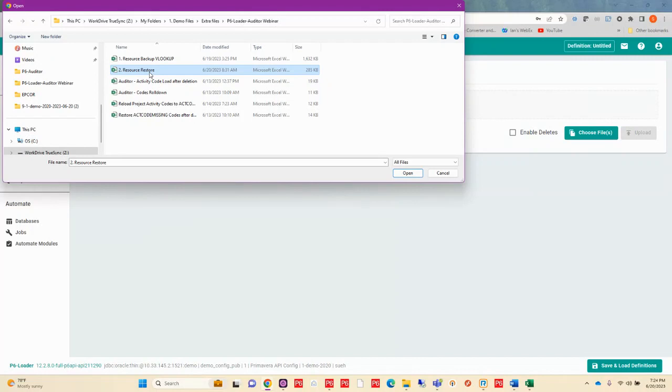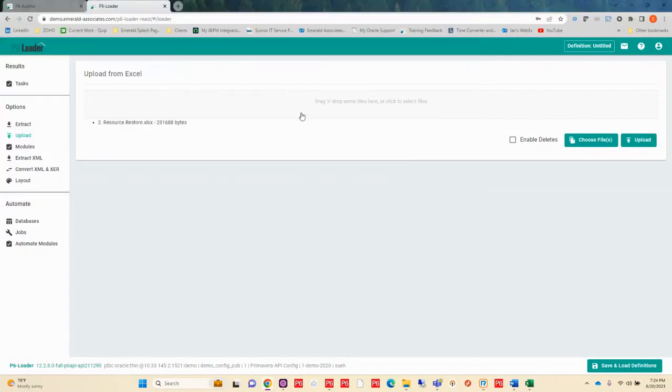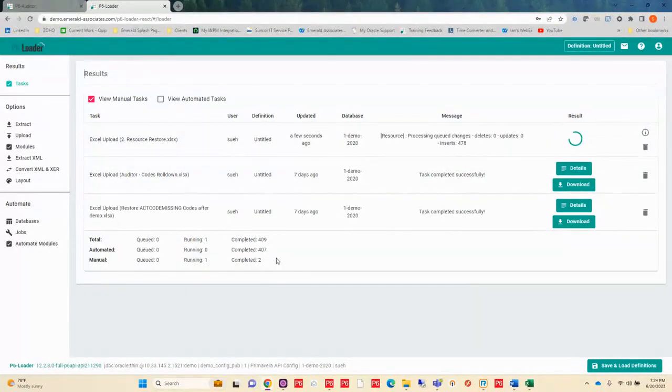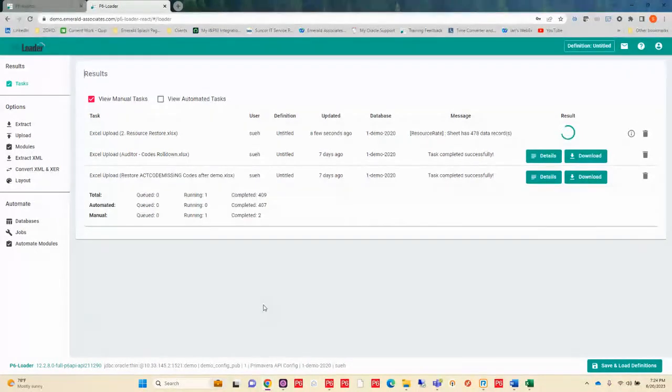Okay. So I'm now going to load my missing dictionary data into P6 based on my lookup and the information I got from Auditor, as well as my backup in P6 Loader. So I can just go ahead and upload this file. P6 Loader is going to go in and create that tree in my dictionary again. So once it is finished, it's going to...